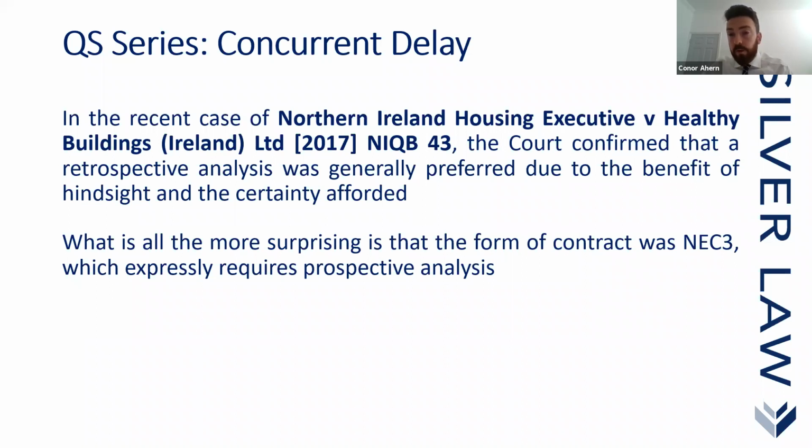But what the court here is saying is that with retrospective analysis, because you basically have visibility over all events, it can actually be a more accurate form of analysis, which does make sense, because you have full visibility of all events that have been carried out, but also all events that have delayed the critical path, and as a result delayed the overall completion date.